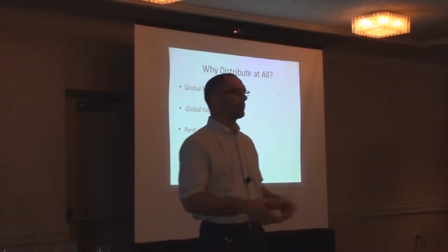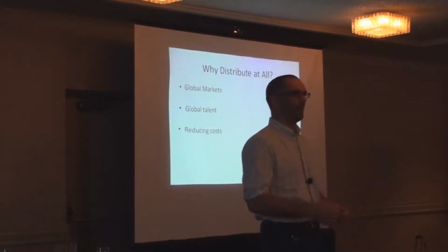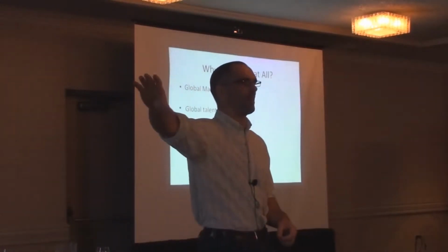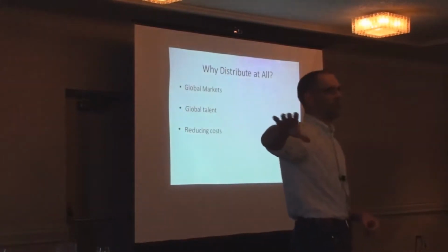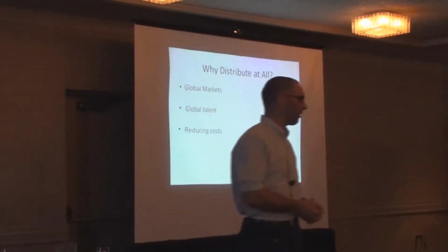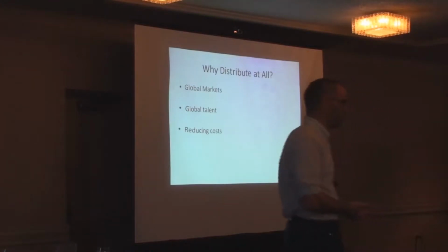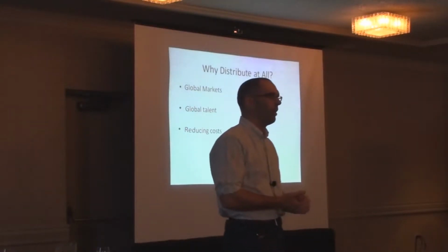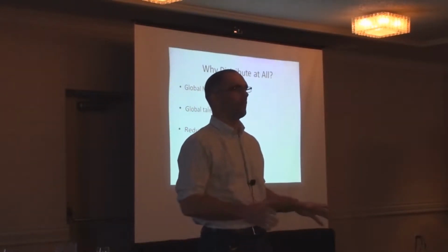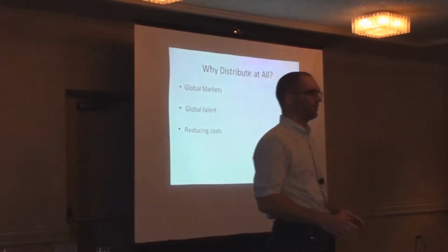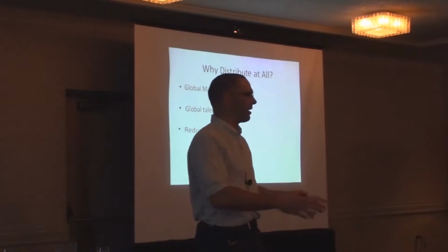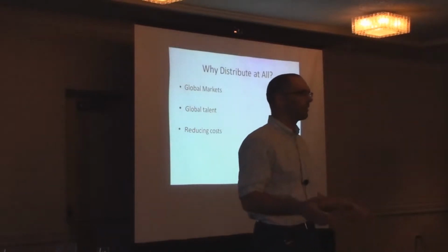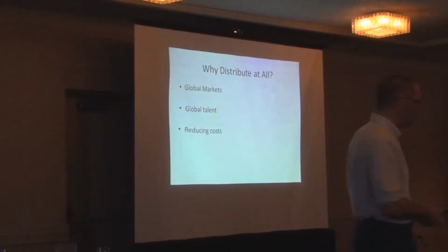Yeah, so a fair number, and certainly one of the things I've observed is co-located in the same building can be good, but it can actually mean, well, we're all in the same building, but the test team are off in some other wing, a 20-minute walk down the corridor, and no one really goes and talks to them anyway, or something horrible like that. It's really noticeable. One of the things that we did during the Visual Studio 2008 timeframe was we got everyone doing stand-ups. And it made a huge difference, because everyone at Microsoft has their own offices, except for my team, for a variety of reasons. And so they all go into their offices and do their own thing. I mean, they might as well be distributed. They're not really in the same place a lot of the time.